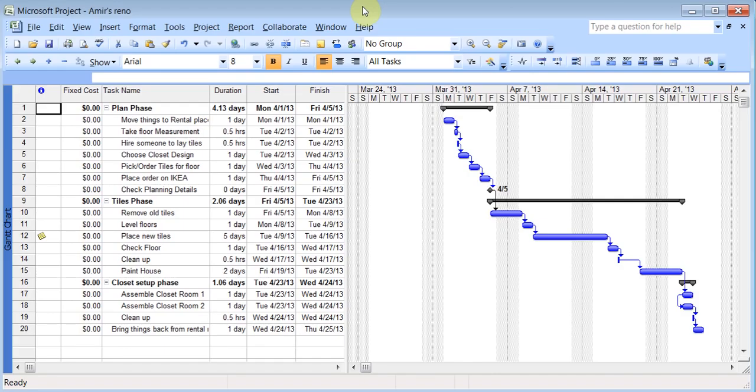You can use individual names, or you can just type the generic name. So say you were working on a project where you're going to have a lot of programmers. So you could just have a generic title, programmer, or you could just type individual names. So you'll find that at different times you want to use it differently.